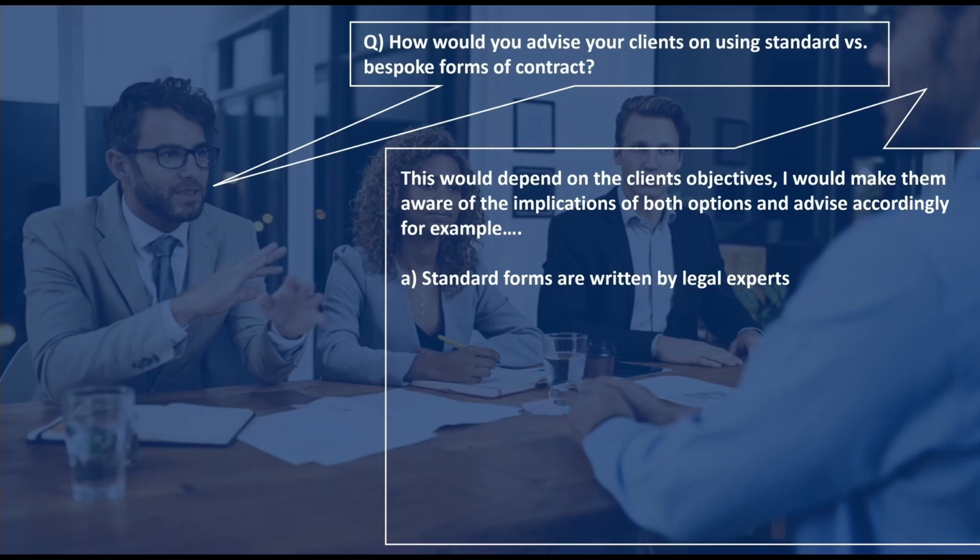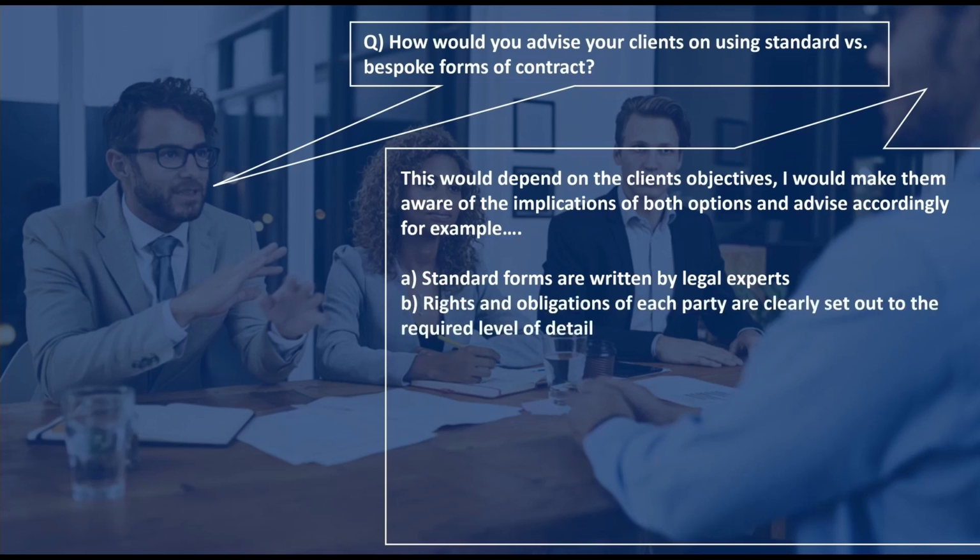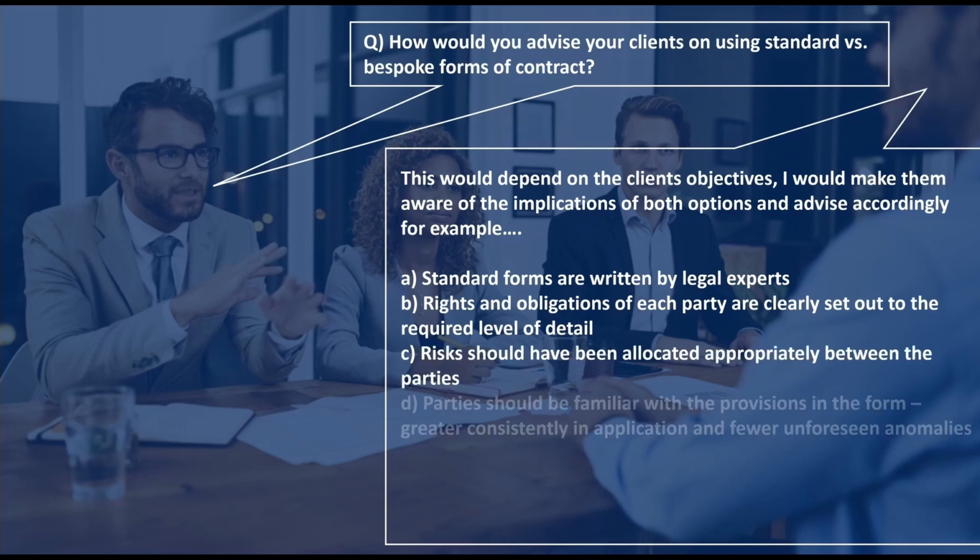We would need to make them aware that standard forms are written by legal experts and that rights and obligations of each party are clearly set out in the required level of detail. Risks should be allocated appropriately between the parties, and parties should be familiar with the provisions in the form, meaning this results in greater consistency in application and fewer unforeseen anomalies.